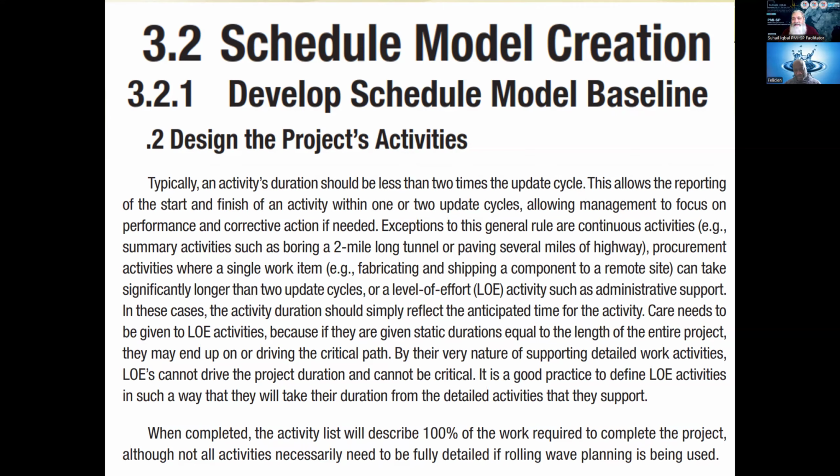Sum up those activities, and that is your progress. Don't go inside the activity and try to calculate how much has been done, because that is yet not done. The activity is still pending. So we will not count it. Got that? Yes, sir. Okay.